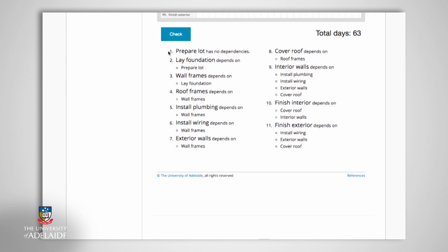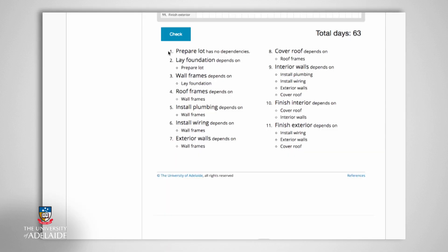Dependencies are the relationships between the preceding tasks and the succeeding tasks. If we take another look at the first three activities of building the house — preparing the lot, laying the foundation, and erecting the wall frames — we need to consider the interrelationships that may exist. Simply put, we cannot start Activity 3, erecting the walls, before we have completed Activity 2, laying the foundation, which in turn cannot be achieved before Activity 1, preparing the lot. Laying the foundation therefore has one dependency, while erecting the wall frames has two dependencies.